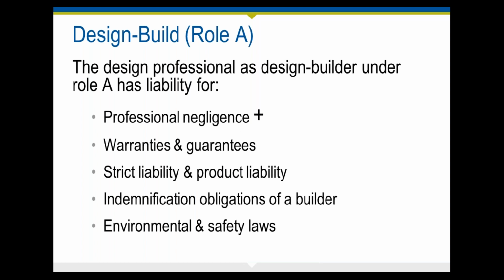So if you are indeed taking this on, you have, of course, liability for professional negligence that goes with it. But the thing that is radically different is now you're responsible for warranties and guarantees, because you're responsible for both the design and construction.